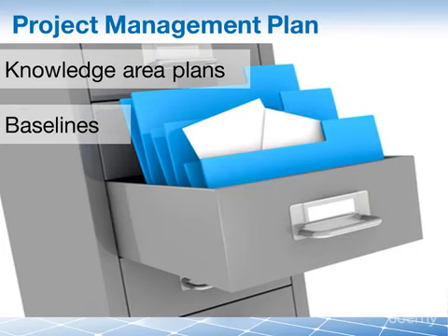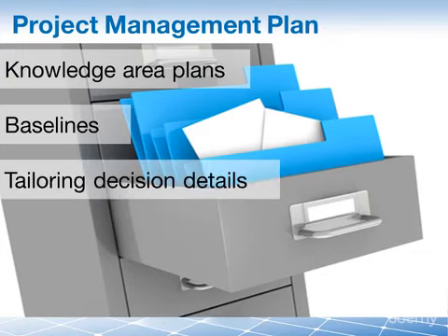We also include the baselines, the scope, schedule, cost baselines, but also the plans and descriptions on how integrity of those baselines are to be maintained. As mentioned earlier about tailoring the plans to the needs of the project, details about the decisions and usage of that tailoring would be included in the plan as well.